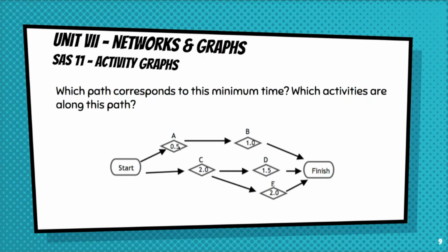So we could put just 3 people on this task and we can get it all done. We put one on A and one on C. A would finish and go on to B, and he would be done as soon as C got done with 2, and then one of them could go to D and one of them can go to E. So you really only need 2 people on this task. But that's not part of this assignment, just something to see. You can actually find the minimum number of people required to complete all tasks. That's not part of this assignment.